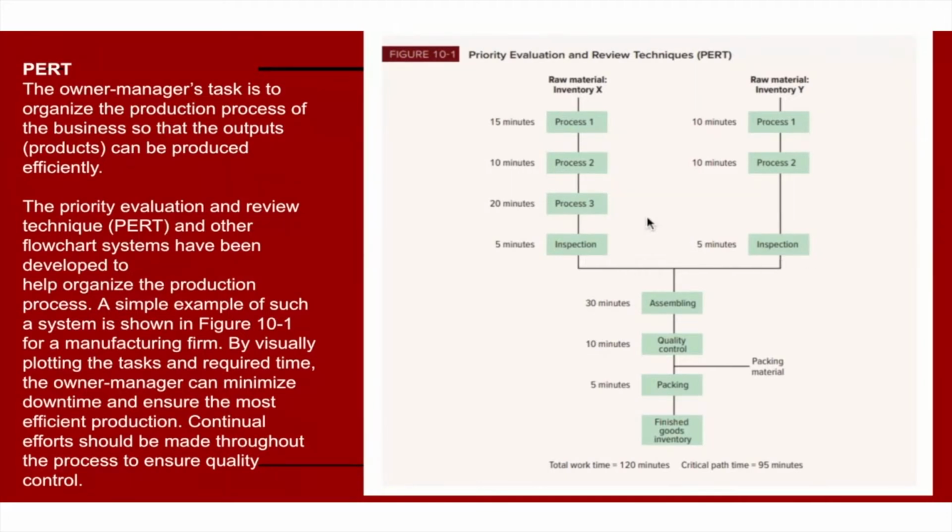Okay, so really, the total amount of time it takes to get down here is not additive. It's 25 and 50. So this one here takes 50. So that's going to be basically the shortest time that you can get two of these sets of things done, because this one here takes longer, and you've got to finish that one in order to allow this one to be assembled. So 50 minutes is the total time that's used here.